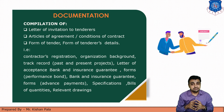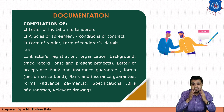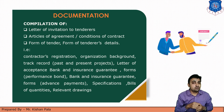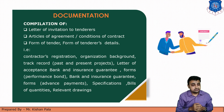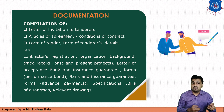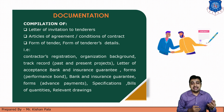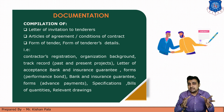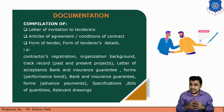The next process is documentation — this is one of the most important stages in the tendering process. The documentation includes the compilation of the letter of invitation of the tenders, article of agreement, conditions of contract, form of tender, and form of tender details such as contractor's registration, organization background, track record, letter of acceptance of bank, insurance guarantee, forms for performance bond, bank and insurance guarantee, forms for advance payments, specifications, bills of quantities, and relevant drawings. These are the required compilation of documents for the tendering process.